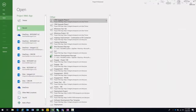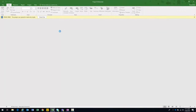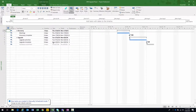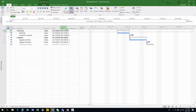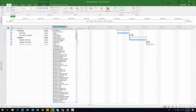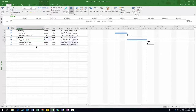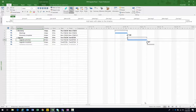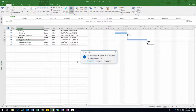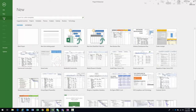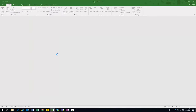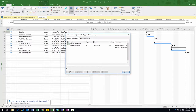Now let's simulate what happens during normal project execution when things take longer than expected. I'm opening CRM Upgrade Phase One and inserting the duration column. Let's say the Upgrade Activities took six days instead of the original five — that pushes things out a little. I'll publish that change. I can see the publish status in the bottom right. I'll close and check it in, then open CRM Upgrade Phase Two.